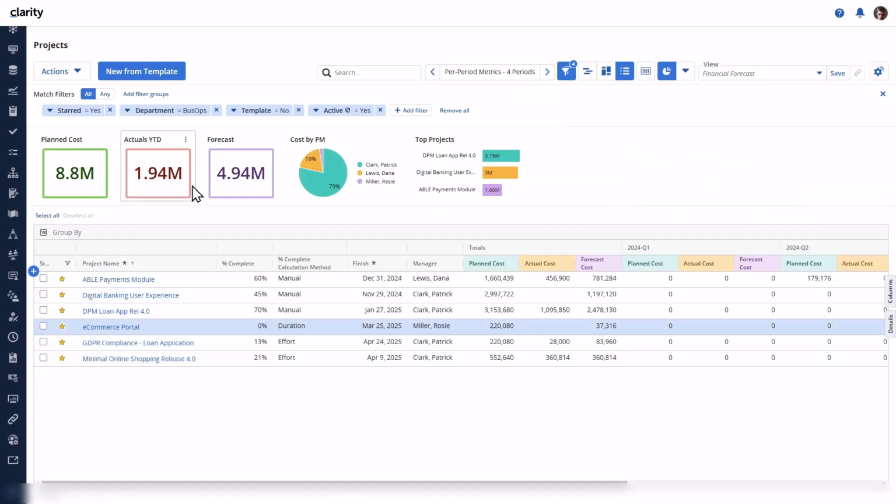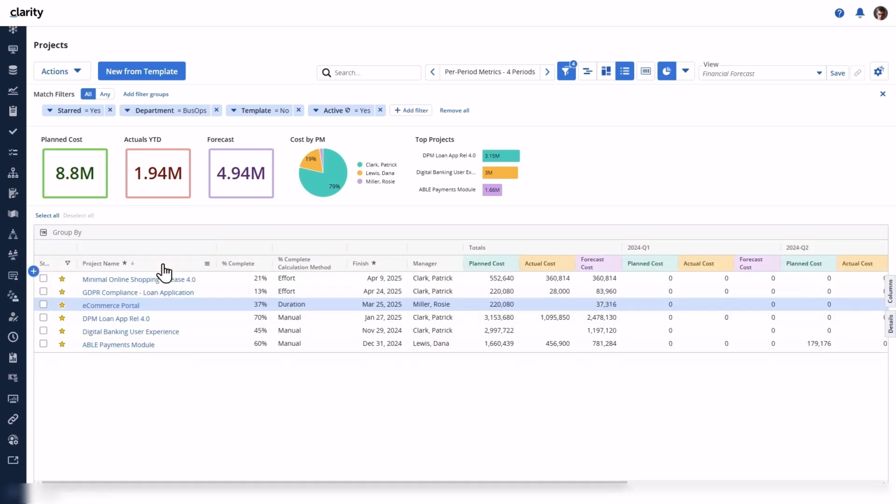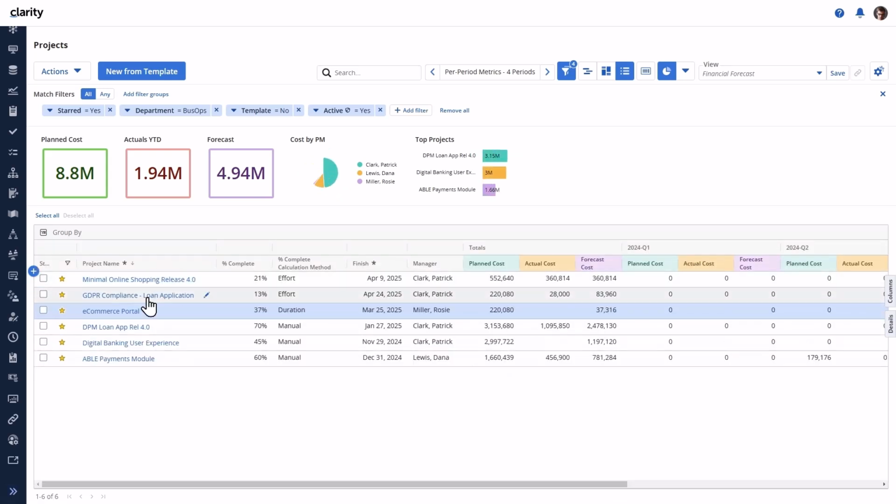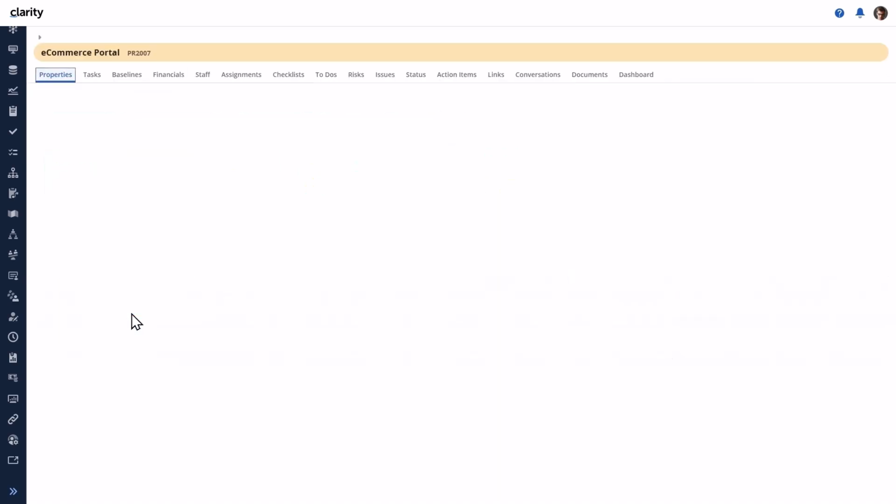Once the job is complete, we can return to the list and refresh the page. The total completed duration based on percent complete is divided by the total task duration to get the overall investment percent complete.